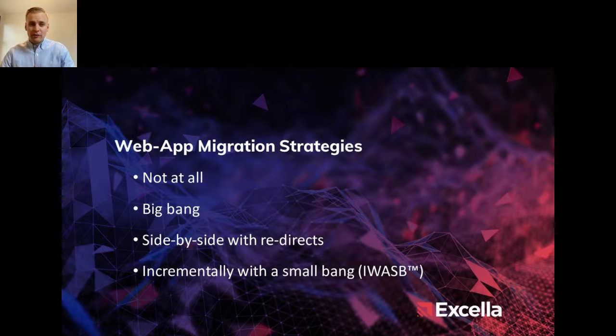I don't recommend this approach because I've seen it happen in other products, and what tends to happen is that you tend to deprioritize the migration. So suddenly you have both apps at the same time, and there's just no clear incentive from the business to move things over. You kind of just get stuck in between usually. So to keep the business's attention and especially funding, I don't recommend that approach.